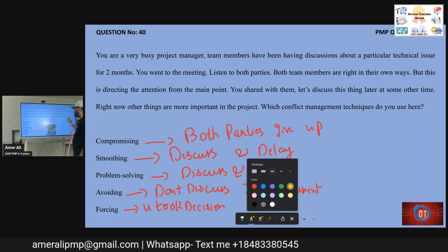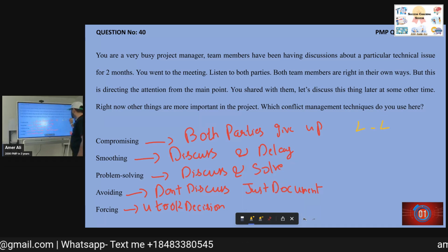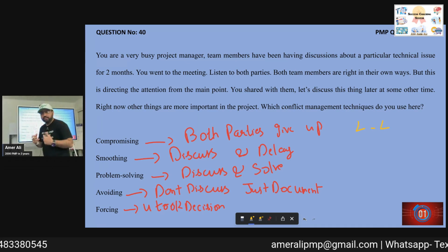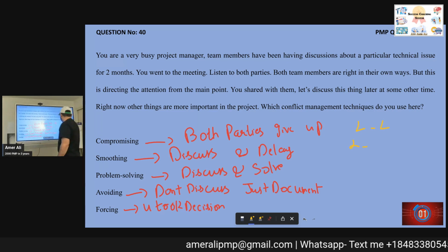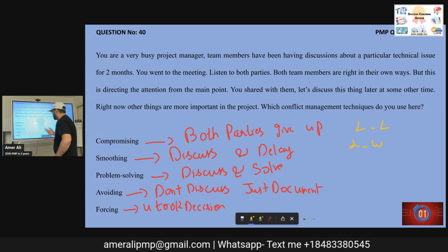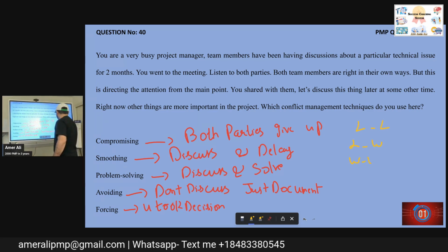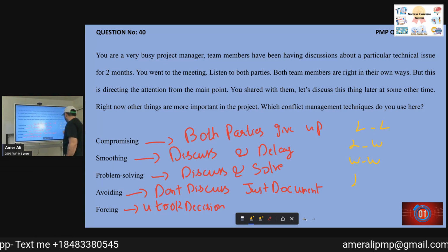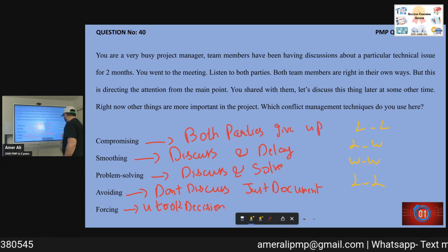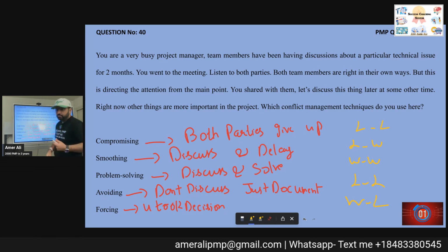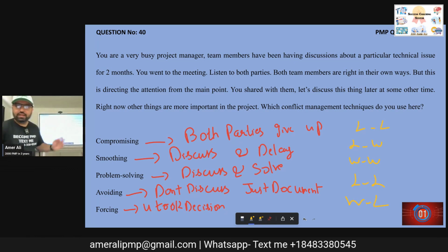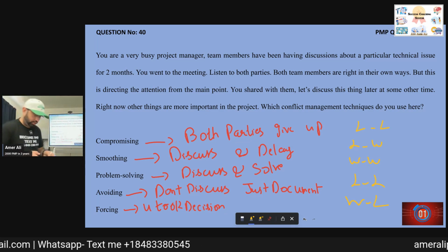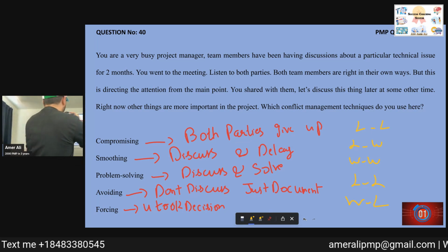compromising is lose-lose. Smoothing, like you are delaying the conflict, but it comes under lose-win. I like to make it more lose-lose, but it is win-win. Problem solving is win-win. Avoiding, lose-lose. Forcing, win-lose, because here I care more about myself as compared to other people. So this is an important integration whenever you are solving the question, and look at it this way.